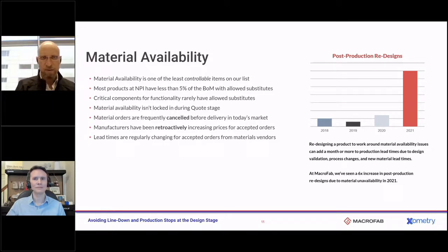And that leads me to that last point right there, is that I've never seen as many purchase orders with distributors and manufacturers get canceled as I have in the past year. That means literally we'll put in an order to buy something, we'll get an agreed price, and 2 weeks before delivery, they'll cancel the PO on us. Oh, suddenly we can't fill that order anymore. We couldn't get that line spun up, we couldn't build those parts. And now you're stuck scrambling to go back and figure out how to address this.